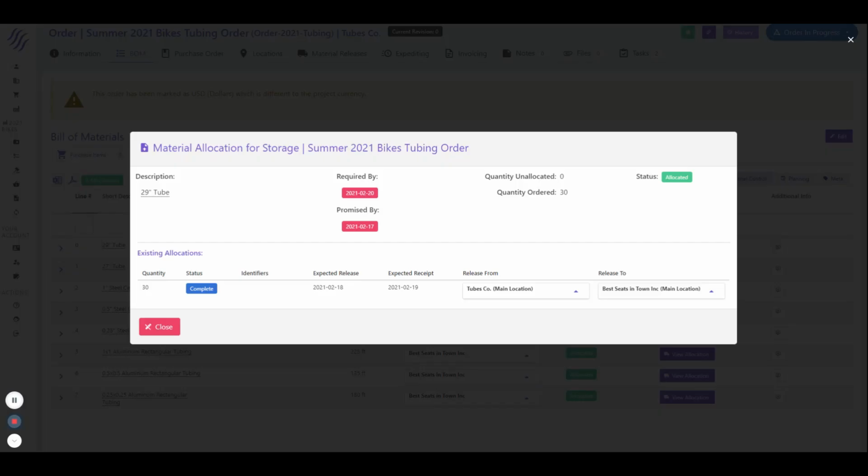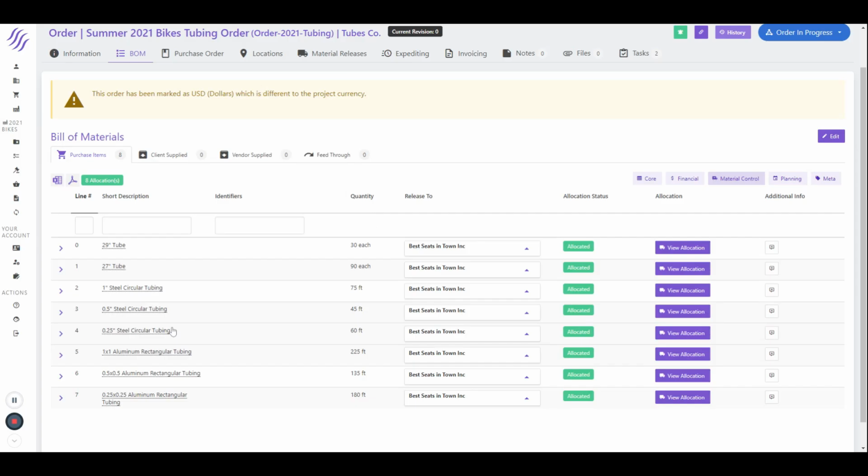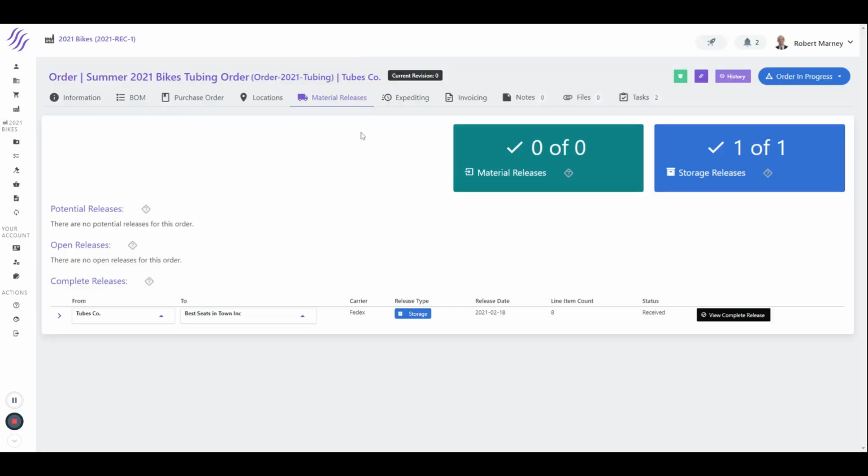Current SEM uses a plan and then execute approach. We are able to plan before the purchase order is even issued, and then continuously monitor and then finally execute on those plans. We allow for multi releases of the same item. Plans are really easy to turn into actual actionable releases, and then we can also get the full history of the releases as they actually happened.